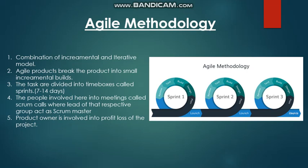In Agile, the product is divided into small incremental builds — Sprint 1, Sprint 2, Sprint 3, and so on. These tasks are divided into time boxes, meaning how much time is required for each sprint to be completed. It normally takes 7 to 14 days for a sprint to complete. After completion of a single sprint, the customer reviews the sprint product, which leads to an early release — one of the major advantages of Agile.